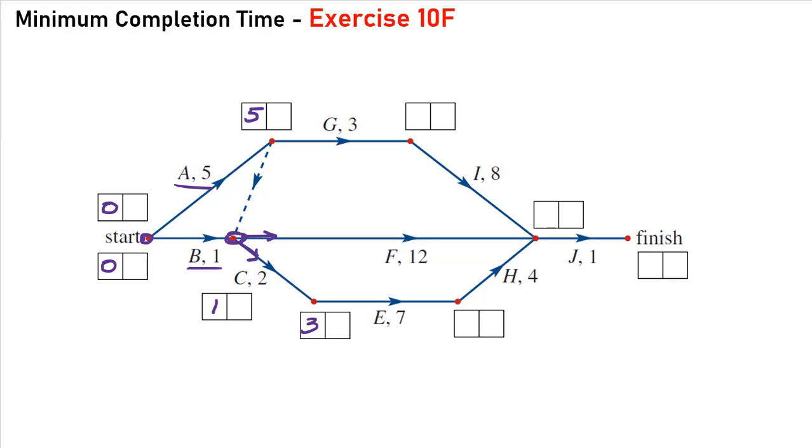So in this case here, that means that the earliest time we can start either of these two activities, and I have it on my diagram here, got a little box for activity F, but the earliest we can start this would have to be 5 hours, because we have to wait before activity A is done before we can proceed with activity F and C. So now activity C, that takes 2 hours, so activity E will be 7.